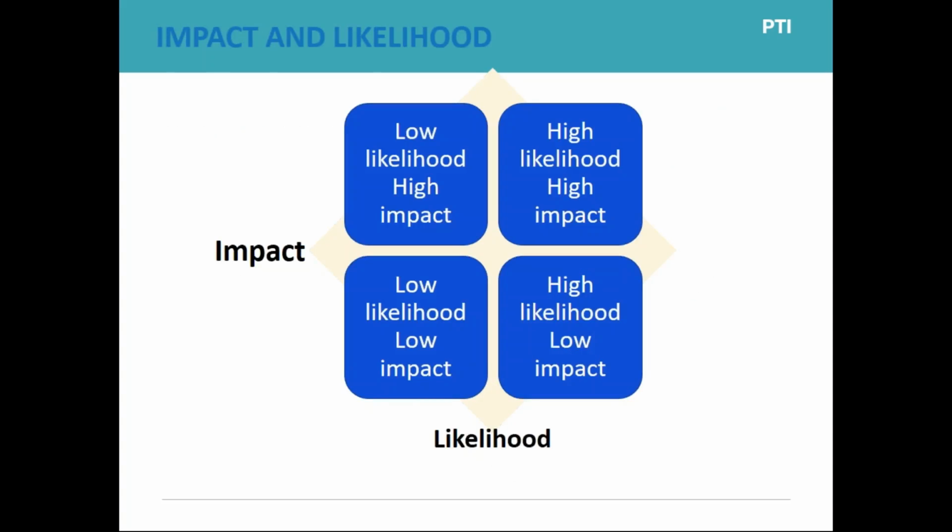So what do you do to identify your risks? Brainstorm, and we'll discuss that a little bit later. Having identified your risks, what are you going to do with your risks? If you look at the pictorial image, you'll look at how likely is the risk to occur. Is it a low likelihood or is it a high likelihood? And then if the risk does occur, does it have a high impact or a low impact?